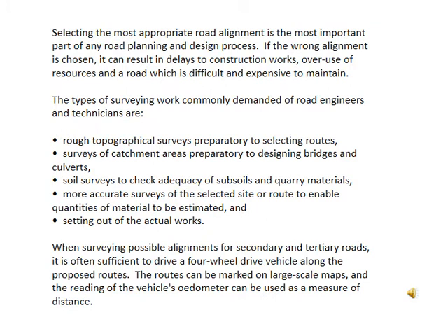The types of surveying works commonly demanded of the road engineers and technicians are, in this case, a topographic survey, preparatory to selecting the routes. So we have to make the survey and then select the route. Then a survey of the catchment area, preparatory to the design of bridges and culverts, and soil surveys to check the adequacy of the subsoil and the quarries of materials.